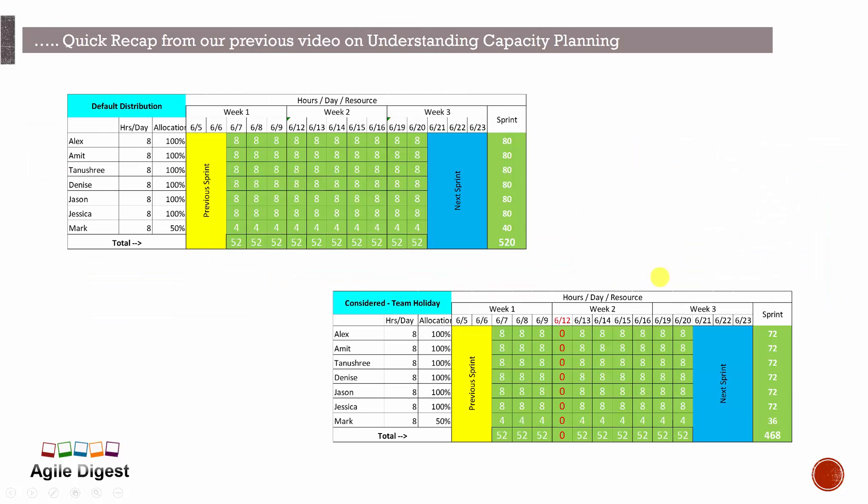So we'll do some calculations based upon that calculation. We'll see how that goes. The default distribution is eight hours for everyone and four hours for Mark every day.